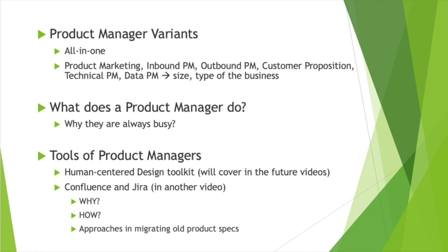And on the working level, you need to figure out how you can break down the roadmap so that the roadmap can become deliverable. So you will have different product features. Let's say they're in the form of user stories, and then they roll up into epics. So you have those user stories in your product backlog. You need to prioritize the user stories that will help you to achieve a certain goal by a certain time. And once these items are prioritized, you need to work on them.